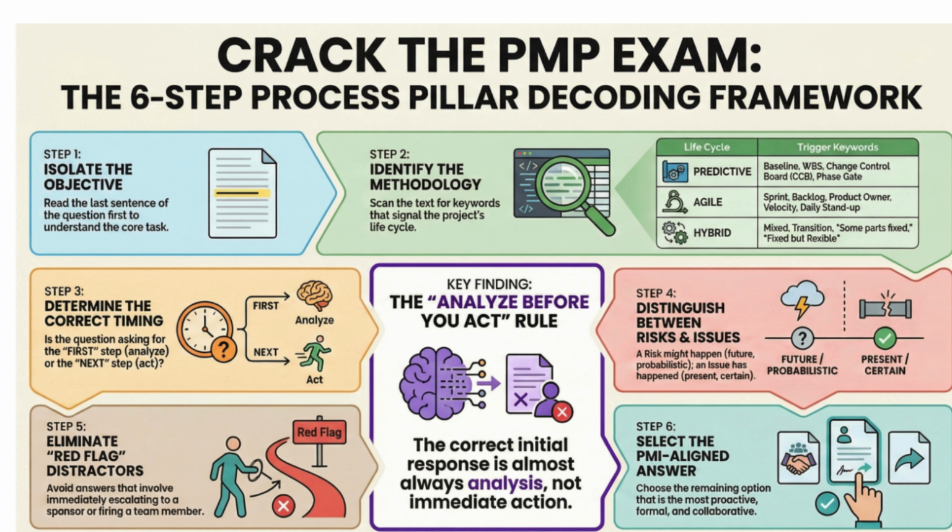Exactly. The PM becomes a translator and a tailor. Their main job is to tailor the processes and bridge the reporting gaps. This means knowing how to talk to a fast-moving Agile team and then turn around and talk to predictive executives who still want their traditional status reports. You might have to create a high-level milestone chart for the executives, but derive it from the Agile team's velocity metrics.